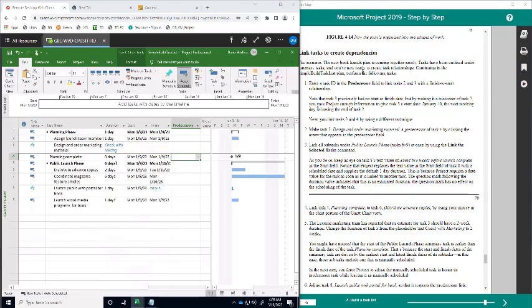Okay, now we are going to link our tasks. Okay, really in Project, if you don't know which task starts before the next, or what's the sequence of tasks, it's sometimes useless, because at this point we're essentially saying that all of these tasks have to start at the same time. The reality is that multiple times one task cannot start if something else hasn't finished before, right?